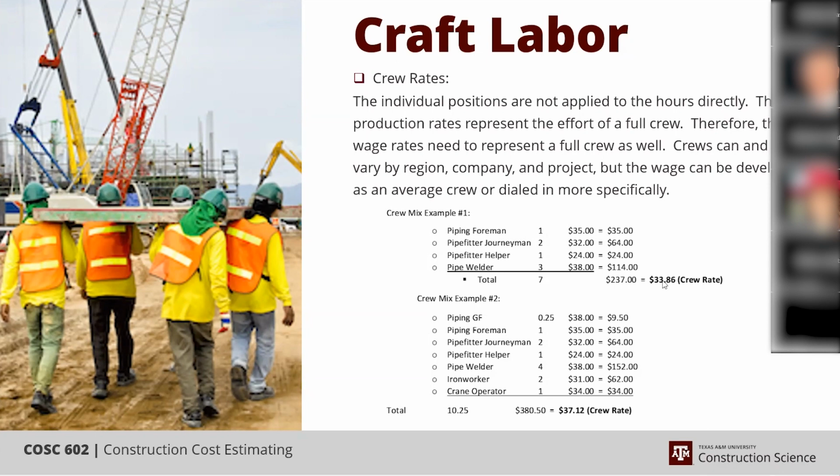Others like to burden it. For the companies that use burden rates in the direct costs, the burdens and benefits for the craft are not in the indirects. For the companies that like to have base comp in the directs, the associated burdens and benefits are in the indirects. Does that make sense?